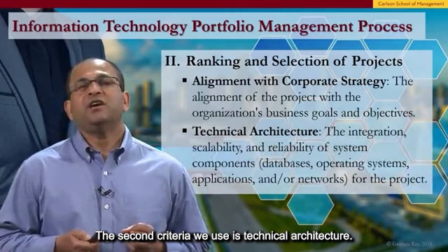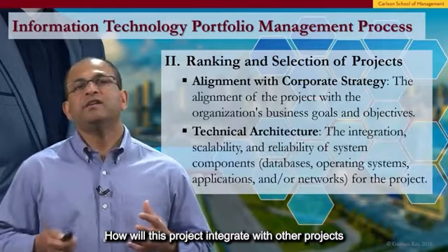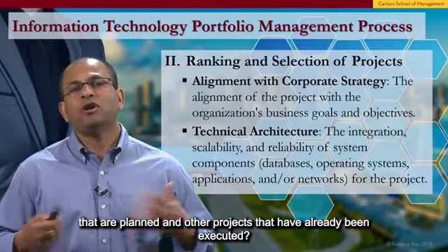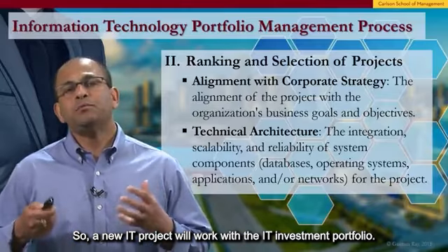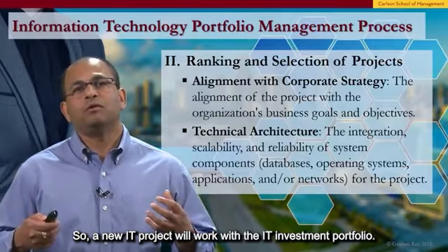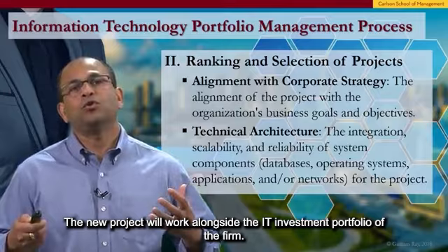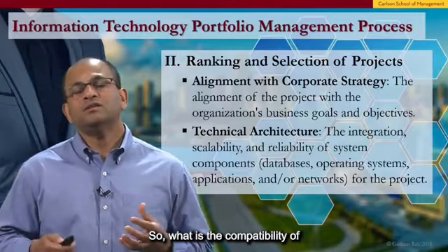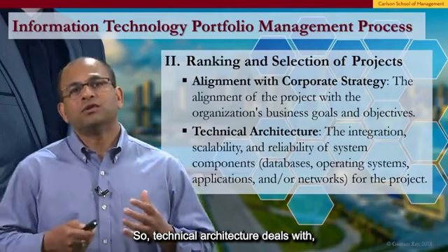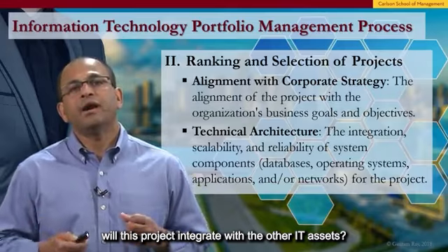The second criteria we use is technical architecture. How will this project integrate with other projects that are planned and other projects that have already been executed? So a new IT project will work alongside the IT investment portfolio of the firm. So what is the compatibility of this project with the IT investment portfolio of the firm? So technical architecture deals with, will this project integrate with the other IT assets?